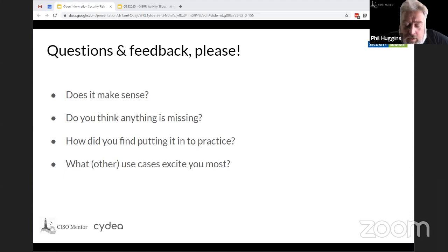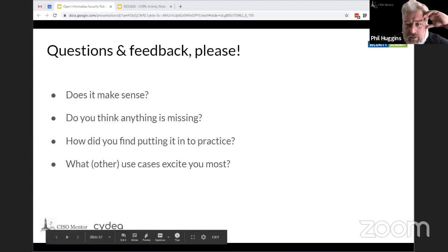I'd also point to the bit of the framework at the moment which is bolted on and we need to find a better use for, which is the risk factors. So risk factors tell you, if you have more of something, your likelihood of occurrence has gone up. If you have less of something else, the level of harm that will occur goes down. They are somewhat specific to the type of event and the type of environment you're in, and they may not be mechanistic.